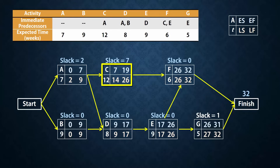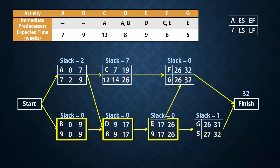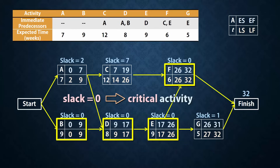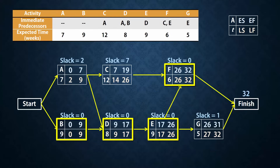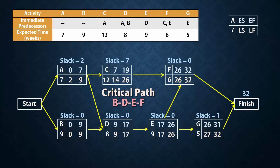Note, for example, that activity C can begin any time between week 7 and 14, and it can finish any time between 19 and 26. Thus, C can be delayed for up to 7 weeks and the project will still be completed in week 32. Activities B, D, E, and F, on the other hand, cannot be delayed at all without extending the project completion time. So if D is delayed by 2 weeks, then the project completion time will be extended by 2 weeks as well, from 32 to 34. The activities with 0 slack are called critical activities, and they form the critical path, which is the longest path in the network. So the critical path here is B, D, E, F. Thanks for watching.